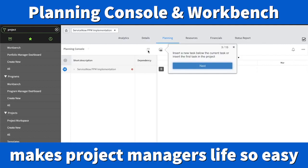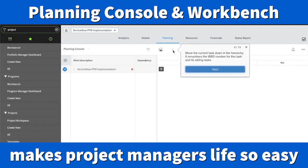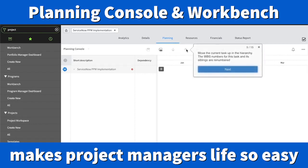Here, you can add a task above whatever task you have, and you can also add a task below. Those are the features. Another important thing is the down arrow, which shows you that you can move the current task down in the hierarchy. Based on the hierarchy, you can make one task go down. There is also an up arrow — in the hierarchy, you have a task and you can move it up, renumbering it accordingly.